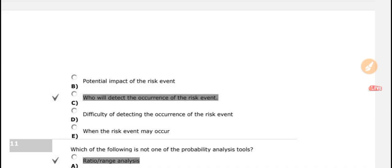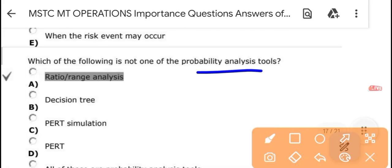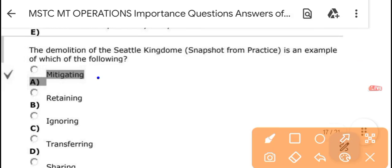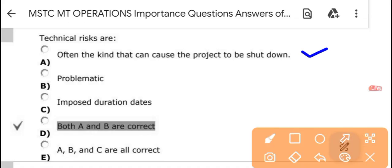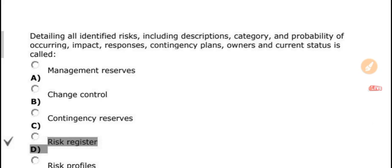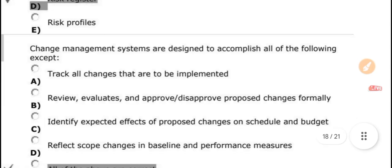The risk profile is a list of questions that address traditional questions of uncertainty on a project, developed from previous similar projects. Which of the following is not one of the probability analysis tools? Ratio and range is not a risk analysis tool. Technical risks are often contained — the project is shut down or the problem is resolved — so both B and C are correct. The document that lists all identified risks, including their category, probability, impact, response, and contingency plan, is called the risk register. Change management systems are designed to accomplish all of the following — all answers are correct.